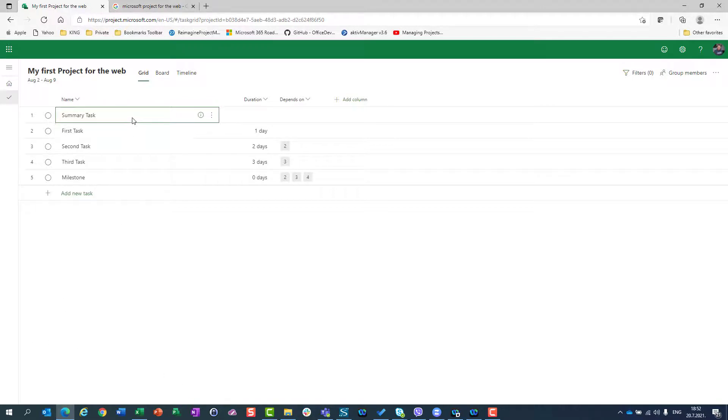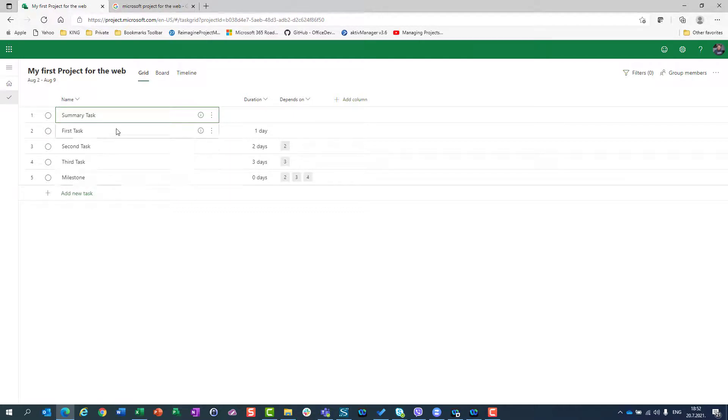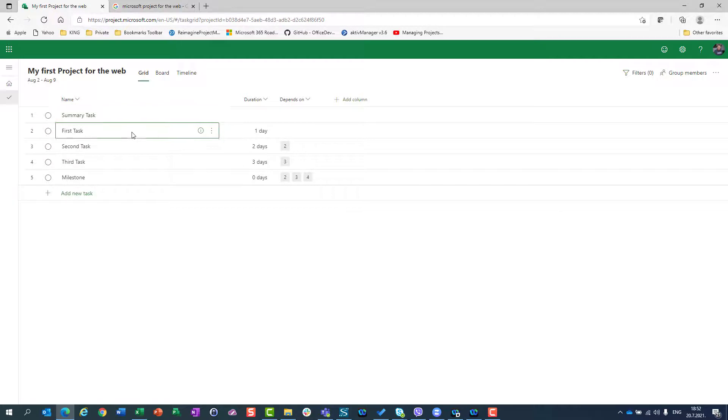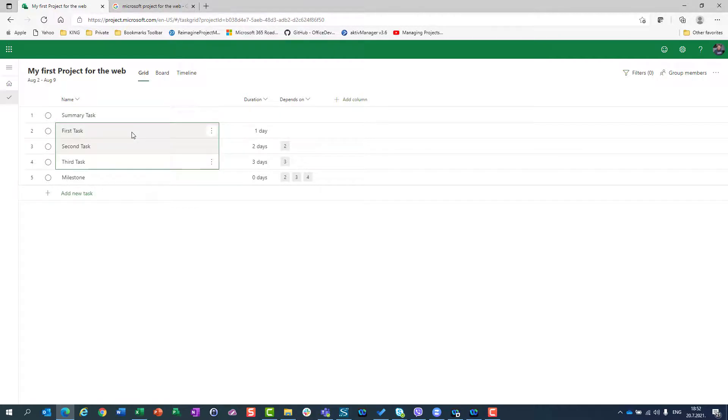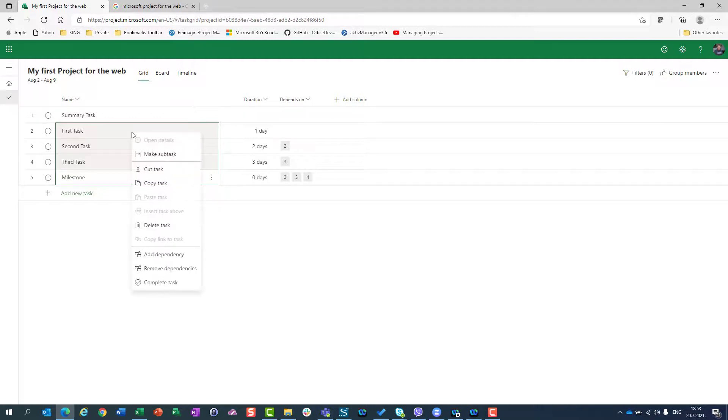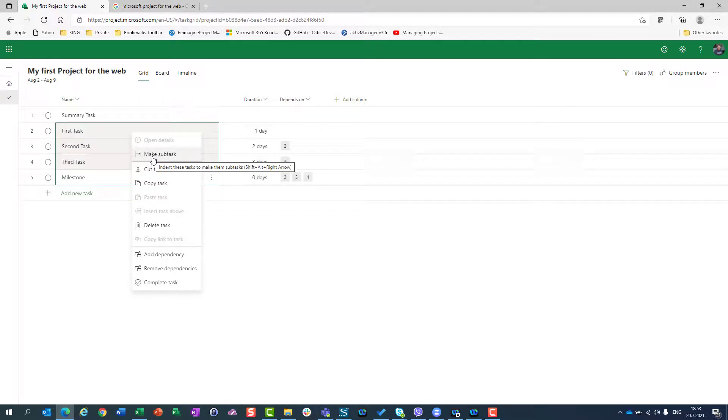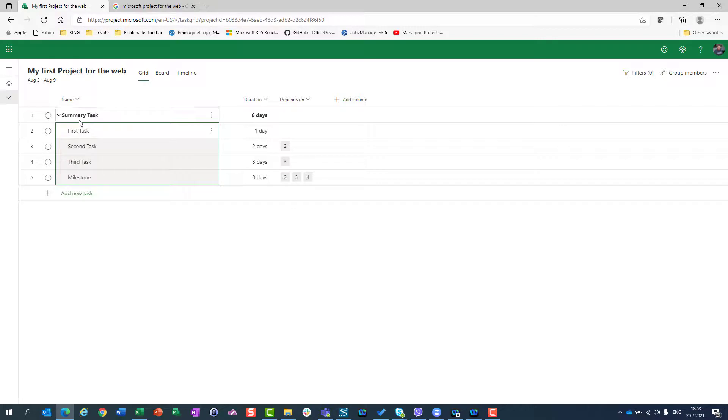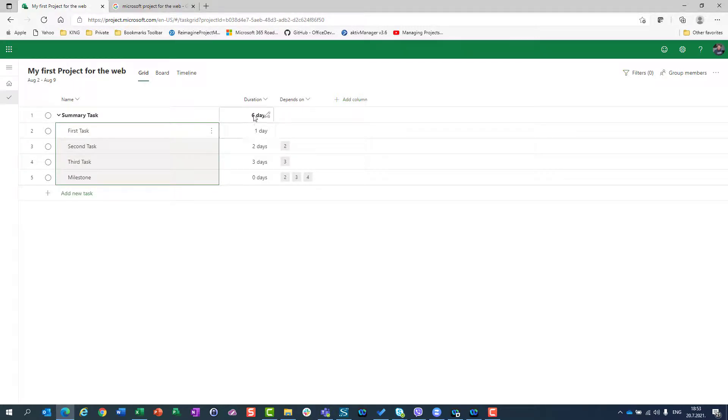Let's say that first, second, third task and milestone are part of my summary task. How can I do that? I will just select all four tasks, three tasks, basically, and a milestone. I will right click on my mouse and I will say make subtasks. When I do that, you will see that this will become summary task and the whole duration will be calculated.